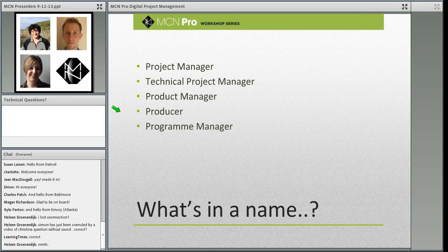And actually having that dual role of deciding functionality and delivering a project, as I say, is sometimes to the detriment of the project, because actually they're sort of pushing in different directions. The person who owns the creative vision is generally pushing for more and more features, making it better and better, and a project manager is pushing for it to be delivered on time and budget. So in my experience, at least, the most successful projects work when those functions are actually separated into two different jobs.